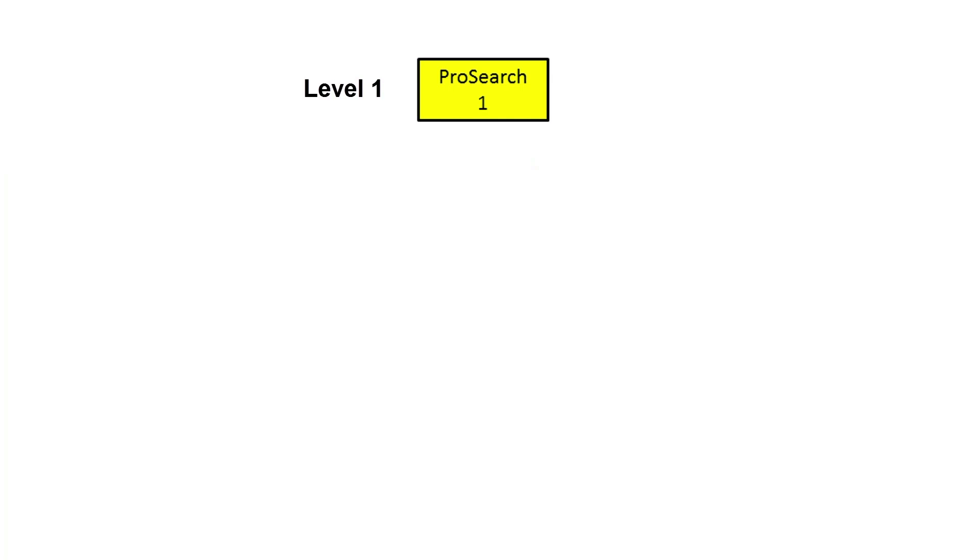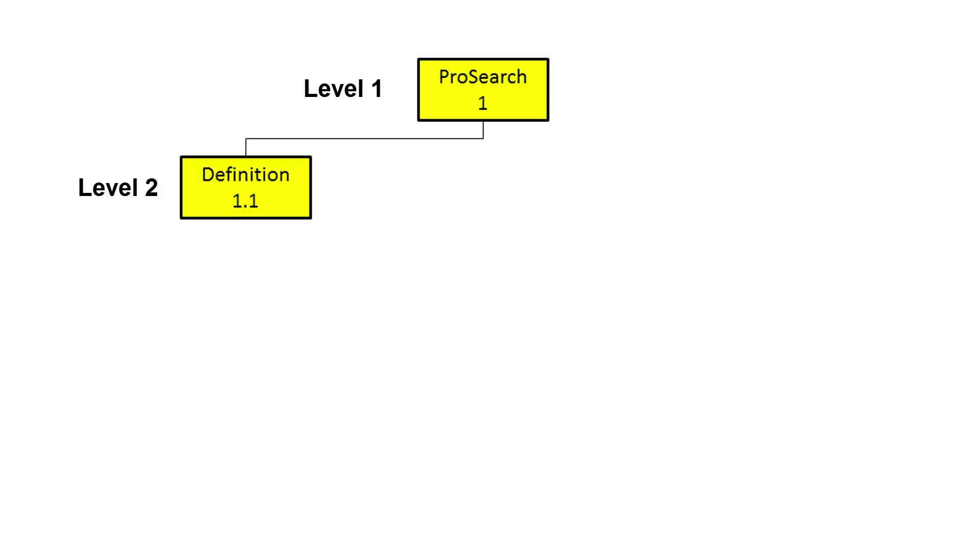Now you need to think about the different major components needed to develop the new search feature. This would include creating documentation defining the attributes of the new feature. So the first Level 2 element would be Definition.